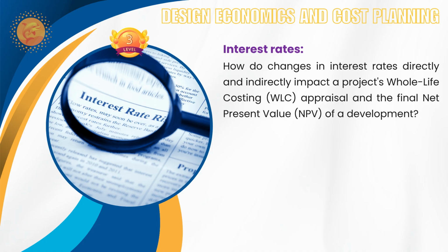A high interest environment also favors projects with lower initial capital cost. So you have to go for economical development rather than luxurious ones, and a faster payback period. So whichever has higher demand, you have to develop those kinds of things. You should not think about long-term development in this kind of situation.